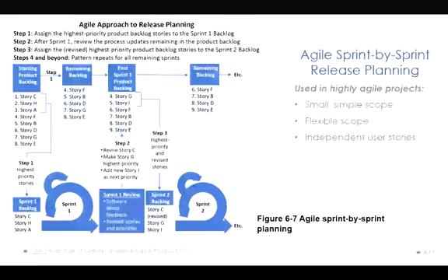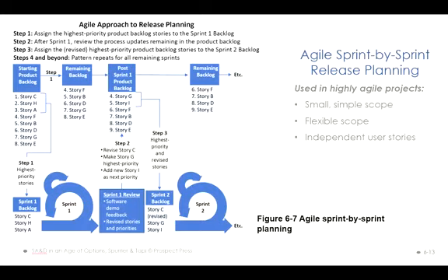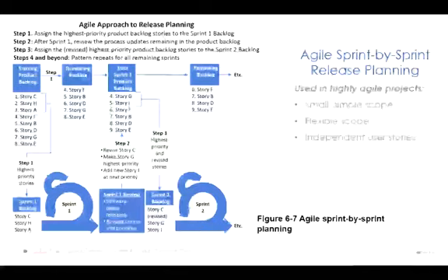It's not like you have a list. Even though we have 1, 2, 3, 4, 5, 6, 7 in terms of sequence numbers in the product backlog, every time you execute, you still need to prioritize the backlog. And the prioritization is actually one of the spirits of the Agile methodology. You always perform the most important, most critical job in your Agile process.